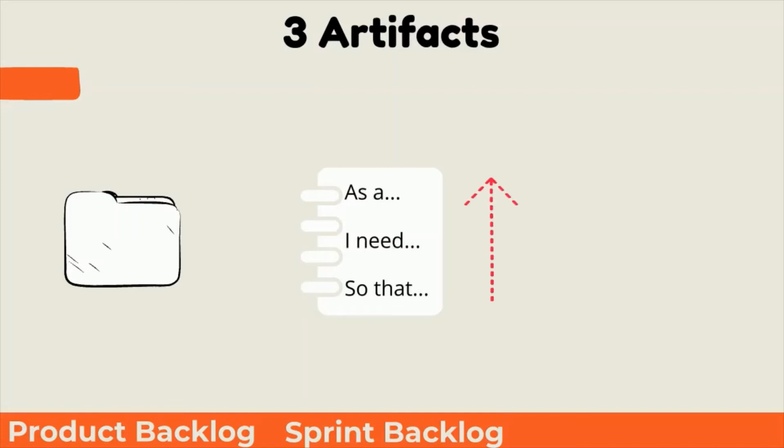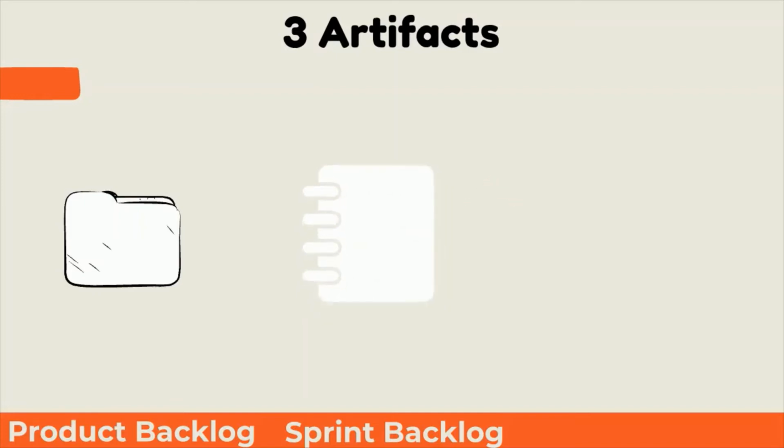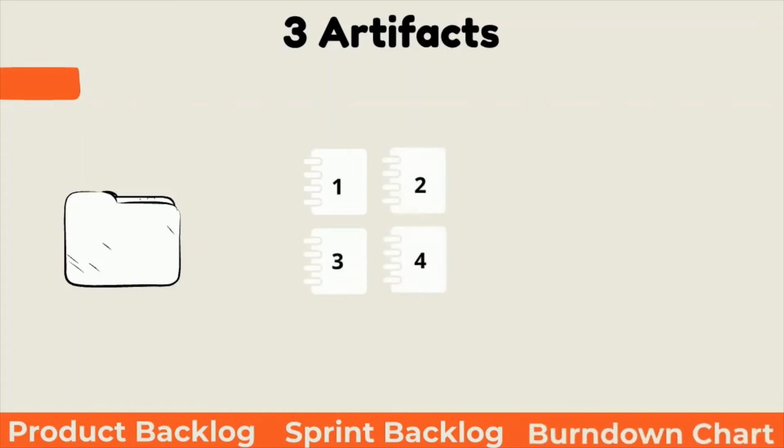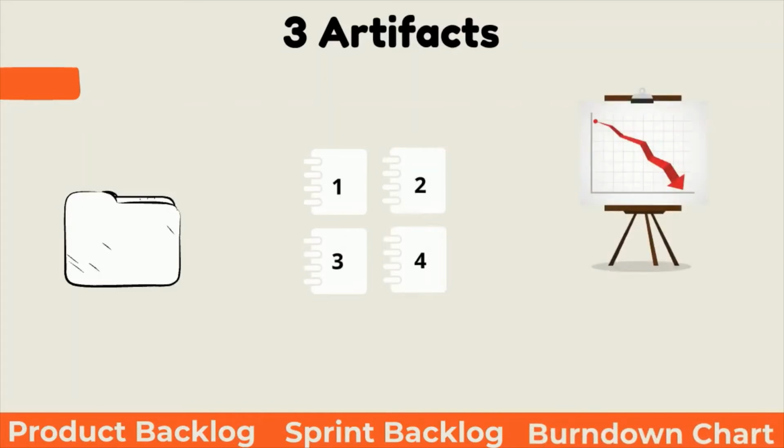The highest priority user story will go into the sprint backlog. This gets estimated for size and is committed for the next sprint. Burn-down charts are used to track progress during a sprint for completion of tasks in the sprint backlog. This chart should approach 0 as the work is being completed.